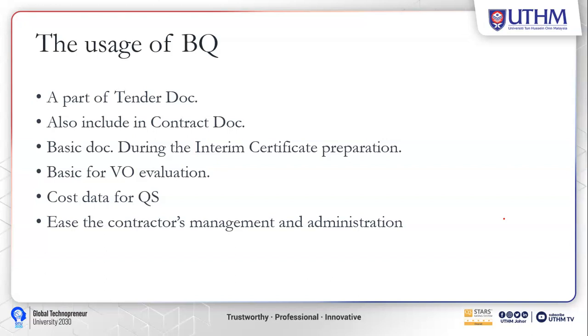Next, the usage of BQ. BQ is the bill of quantity. The bill of quantity is a part of the tender document and will also be included in the contract document. It is the basic document during interim certificate preparation.